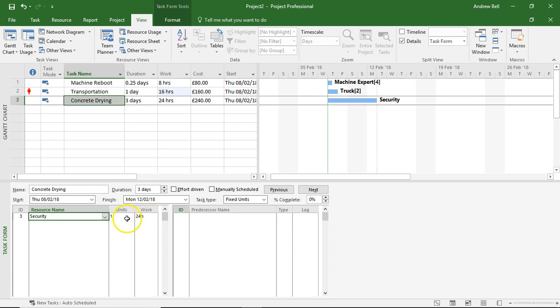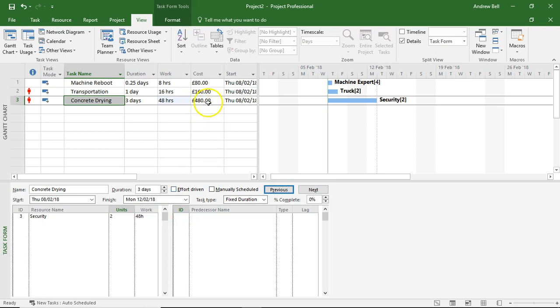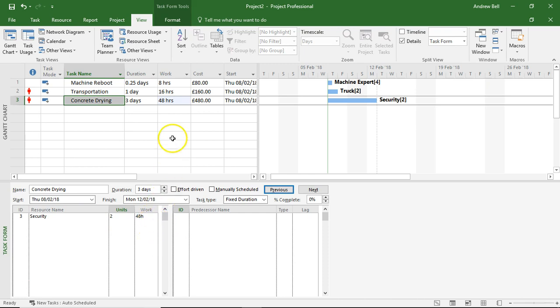The first issue I want to show you - let's make this fixed duration task - is that if I double up on security, I've doubled the amount of work, I've doubled the cost, but the duration is still three days because it's fixed duration. What I probably need to do here is get security working a 24-hour shift so I've got cover over the night, and that will then increase the costs associated with those extra hours of work.